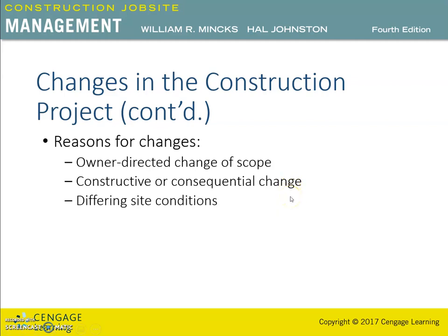Then the changes are also due to differing site conditions. This also can be an area of a contract change. This change usually applies to differing subsurface conditions that are indicated by the contract documents or are available from the geotechnical reports. Occasionally, actual conditions will not appear as assumed by the designer and as indicated in the construction documents.